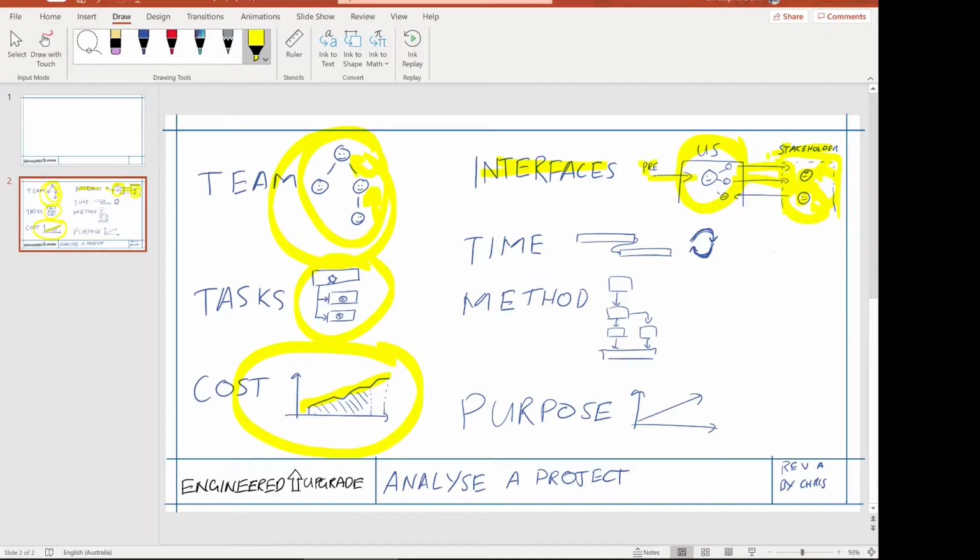Because the next thing I like to think about is the timeliness involved. So this is where we take those tasks and we think about what order they need to be completed in. Is there a strict order? Can those tasks change over time? I've got a couple of little diagrams I like to draw here, a traditional Gantt chart, or sometimes I like to think about the tasks as a circular effect. So for example, on this engagement with this client, the requirements changed and evolved as the project went. We had to take a more agile approach to meet the changing requirements of those complex set of stakeholders. So we were able to do so by maintaining a bit of an agile approach to those initial task requirements that we can then adapt to and consider over time.